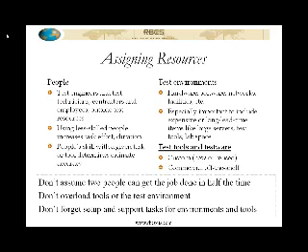And that's typically not true. So as you go through the resource assignment, you have to look at, is this the most qualified person on the team? If not, do we need to revisit the estimated effort and duration?